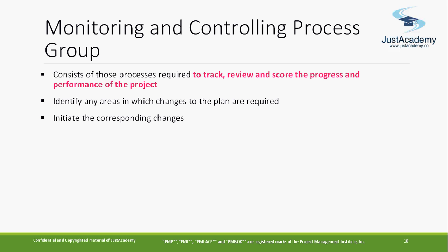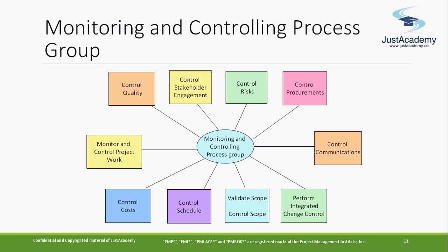But that's not the standard process. On bigger projects, any new change has to go through the proper change control board, where the project team and the business, the customers who requested that change, will meet. They will have a broader discussion on why you want to include this change. If you include it, how will my schedule be impacted, and how can the cost increase. All these things need to be discussed before you include the change in your project. So there are a lot of things that happen.